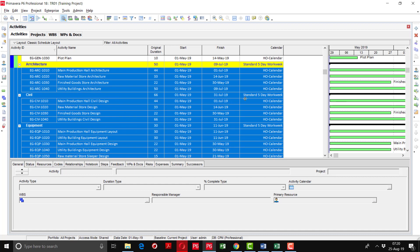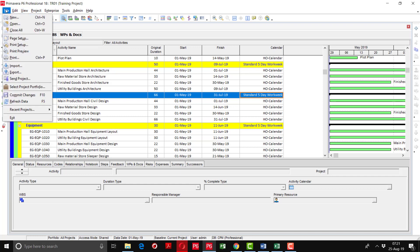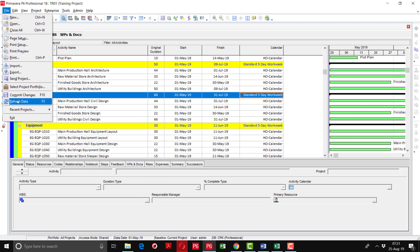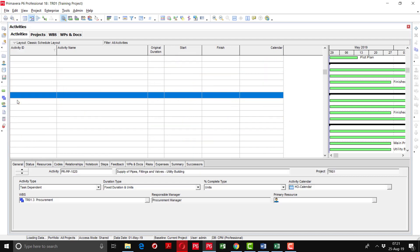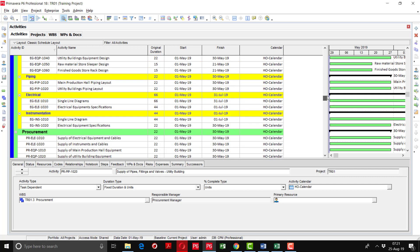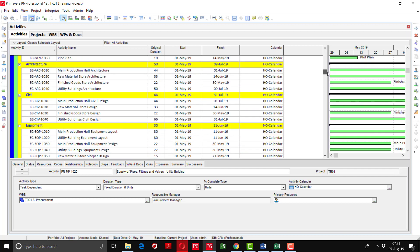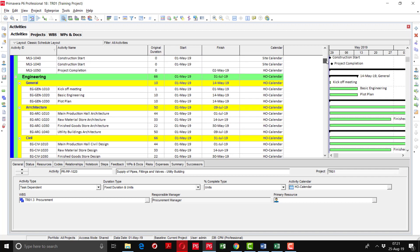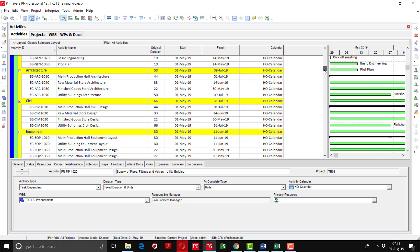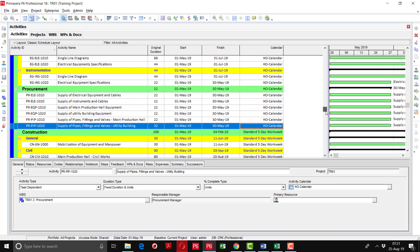But don't be surprised that here it is showing standard five day work week. It is the WBS level. You can just simply refresh by going into the file option, Refresh Data, or either you can press F5. It will refresh the data and you can see that on the WBS level this change has been applied.